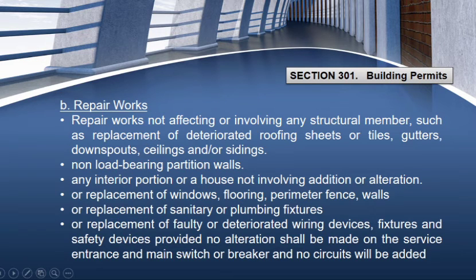Letter B, repair works. This includes the following. Number 1, repair works not affecting or involving any structural member, such as replacement of deteriorated roofing sheets or tiles, gutters, downspouts, ceilings, and/or sidings.